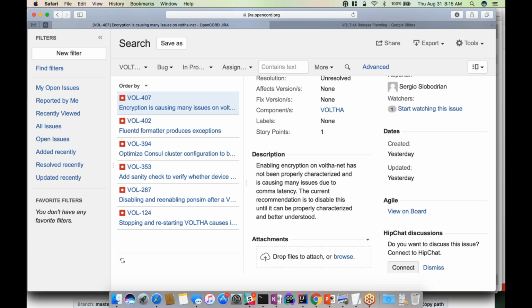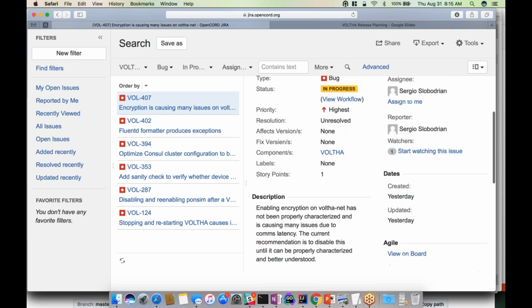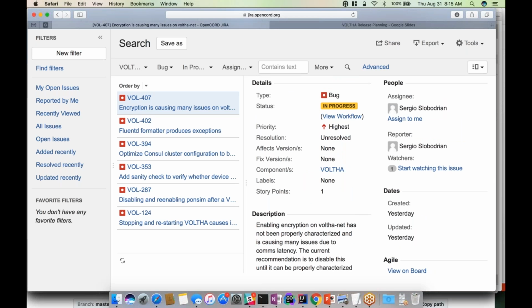So I guess I'm trying to understand the process better. I thought we were focused on issues that were in Sprint 5. So are these issues not considered part of Sprint 5 and not relevant to the release? I think these were probably found during the system integration test. I would just assume that system integration is part of Sprint 5. Yes, we've been stretching out the sprint to account for defects found and to also address them.